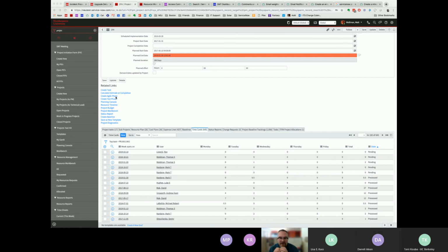So I guess you're not going to get the breakdown into the story level or maybe the epic level, but you could at least say, okay, here's my project, here's my different agile phases, and here's my project tasks in each of those phases assigned to different people, and I can resource against those, and they charge their time. So you can still do your upper-level project management in ServiceNow plus your resource management against those tasks, but still have them manage their stories in Jira without any specific integration between the two. That's really just a matter of picking different phases.